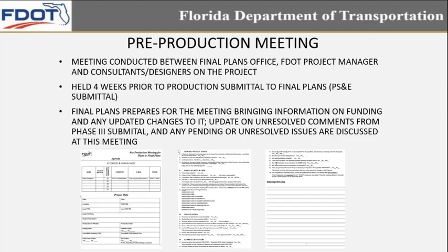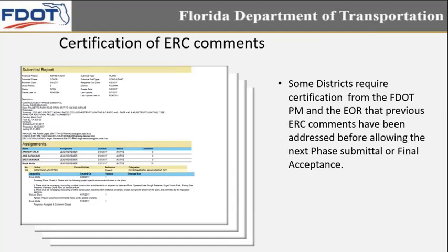Make that aware to people at the meeting ahead of time. That's one of the tools that we use in District 4, and we've seen other districts do it in a little bit different mechanism sometimes, but have found a way to replace the Phase 4 submittal with face-to-face meetings as being more effective.